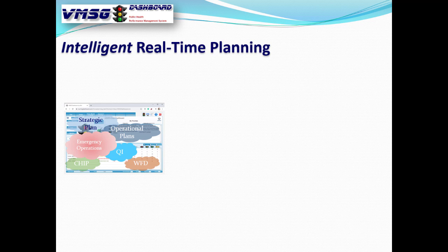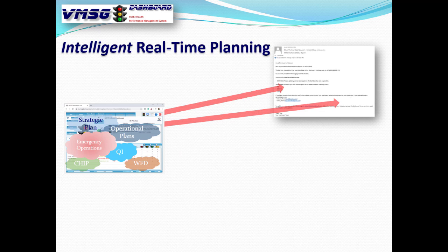What's going to happen on that Wednesday at about 1 in the morning, the system's going to go in and look at all your users, and it's going to ask 3 questions. Number 1, have you been in the last 30 days and updated your stuff? Number 2, do you have anything that's behind schedule? Number 3, do you have anything that's overdue? If any of those is true, out go the emails. The emails go out to both internal folks as well as those selected external partners.